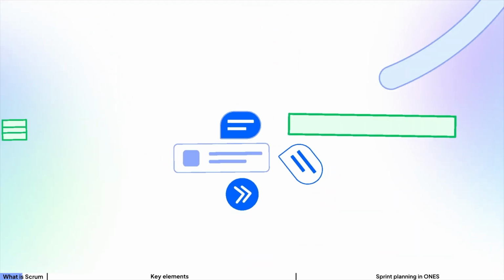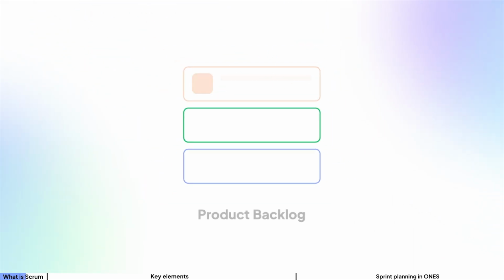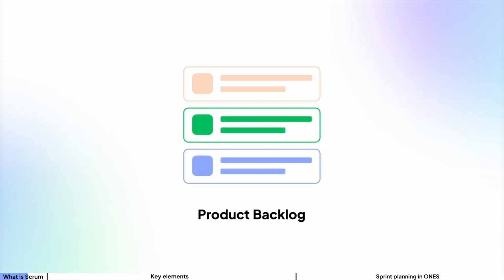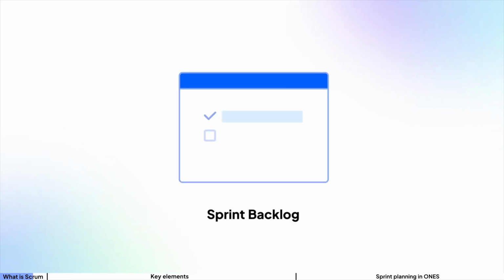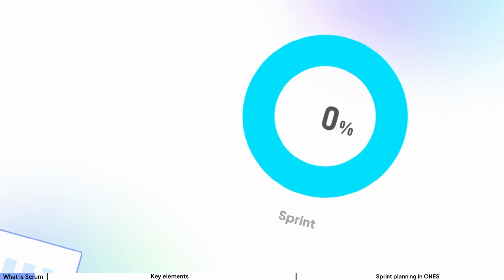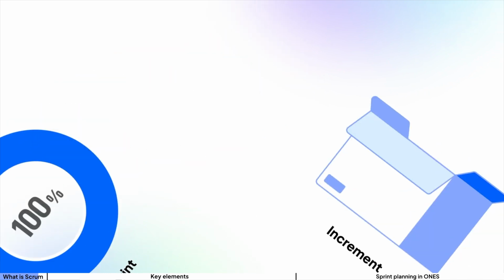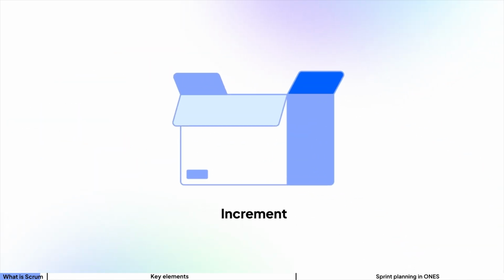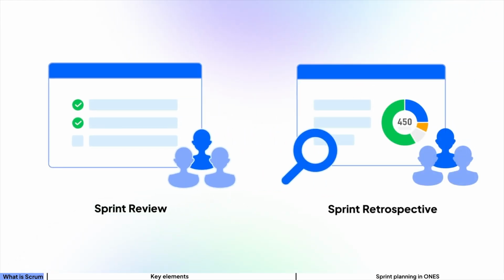Here's how Scrum works. The product owner collects requirements from different stakeholders. Then they'll create product backlog according to the feedback. During the sprint planning meeting, they'll plan the prioritized product backlog items into sprint backlog. Then, the development team starts working on sprints to deliver product increments, delivering increments of valuable work in short cycles. And, after delivery, sprint review and sprint retrospective will be held, which marks the end of the current sprint.